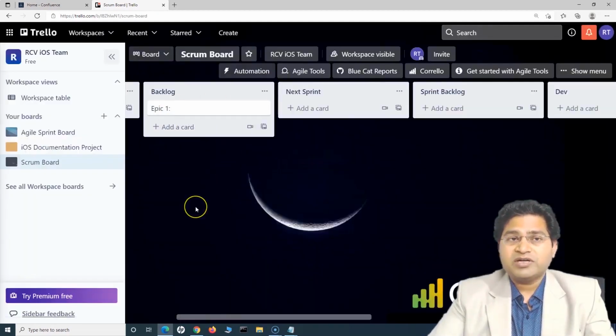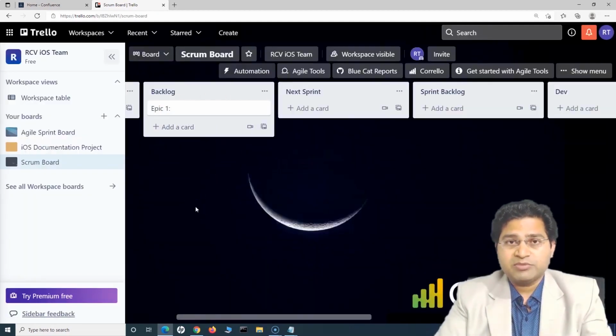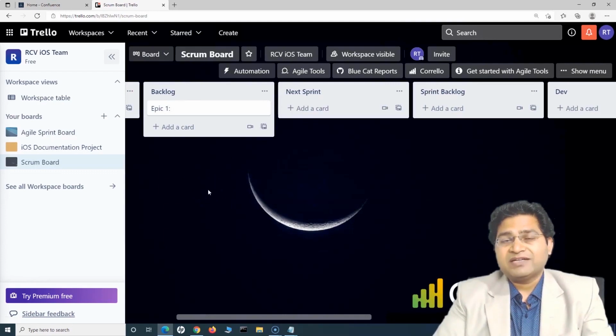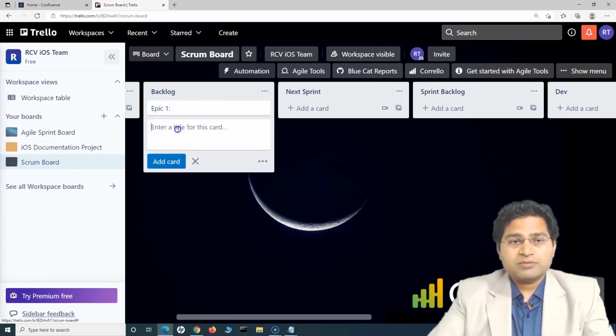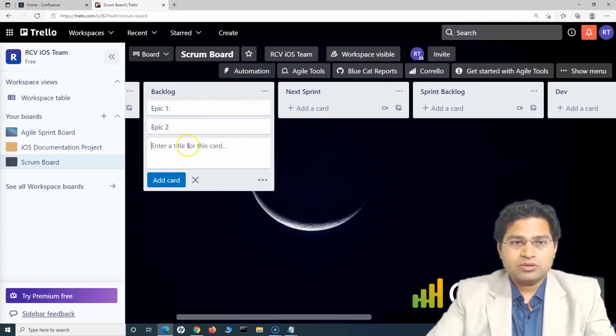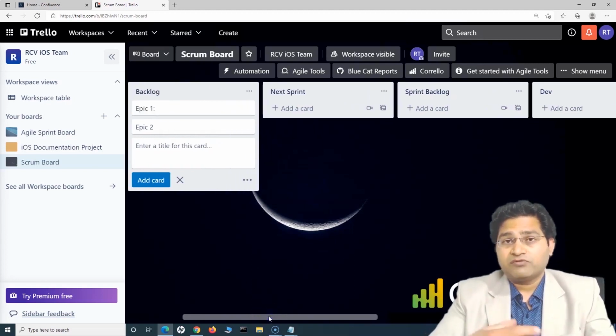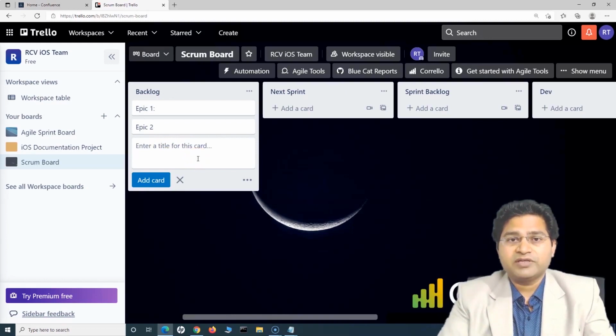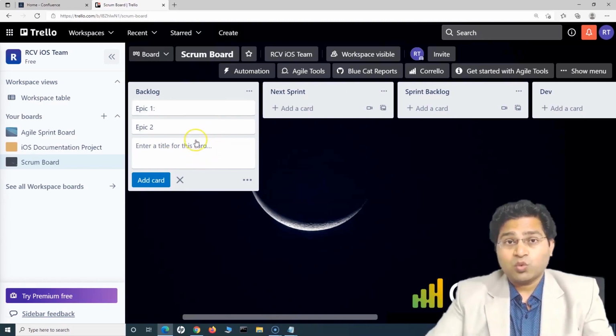So in the general software development lifecycle, whichever team is using Scrum will follow that whole backlog structure. All the work items that need to be delivered, say for example in 3 to 6 months down the line, will be added here as cards, right? That's how you will keep adding work items in the backlog. Now the next thing in the software development teams that are using Scrum is that they will have the sprint planning session, right? During the sprint planning, they'll discuss what work items they can pick and put into the sprint.